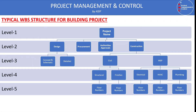On the screen you can see a typical work breakdown structure for a building project. Level zero is the project, then level two includes design, procurement, authority, and construction. At level three, design is decomposed into concept, schematic, detail, and IFC drawings. Procurement is decomposed into procurement of design engineers, procurement of supervision engineers, and procurement of different subcontractors and contractors.